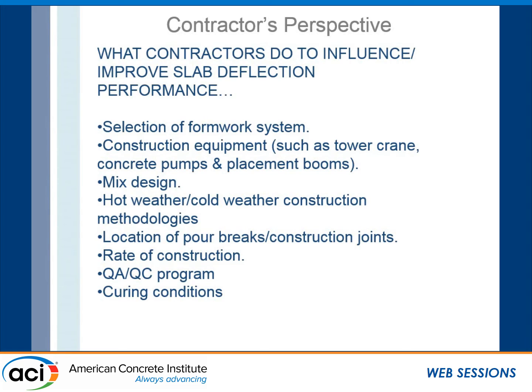Location of pour breaks and construction joints, the rate of construction, and the QA/QC program, making sure that we're putting the concrete where we're supposed to, and also putting the rebar where we're supposed to, and then ensuring that we have the proper curing conditions.